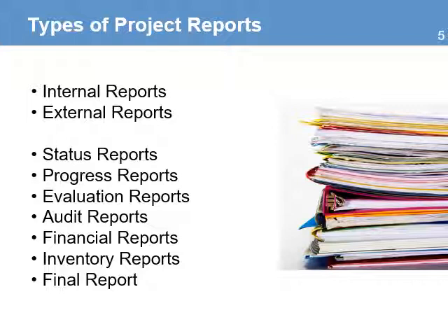Progress reports that provide information to management or the donor about the progress of the project. They are usually done every month. You also have evaluation reports that happen midterm or at the end of the project. Also, audit reports that focus on the use of resources and compliance with organizational and donor regulations and policies.